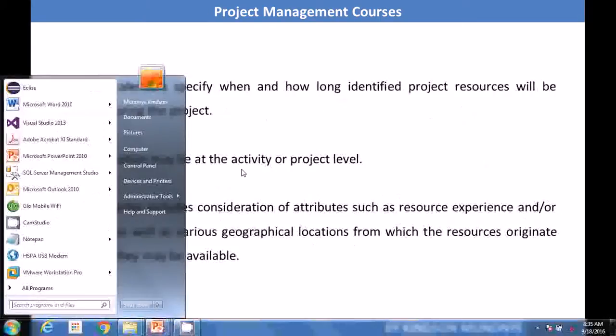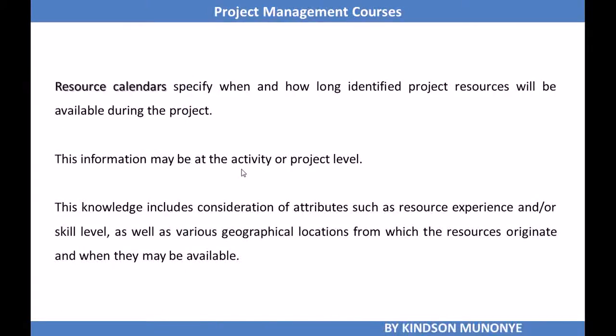Let's talk a little more about resource calendars. Resource calendars specify when and how long identified project resources will be available during the project. This information may be at the activity level or at the project level. This knowledge includes consideration of attributes such as resource experience and skill level, as well as various geographical locations from which the resource originates and when they may be available.